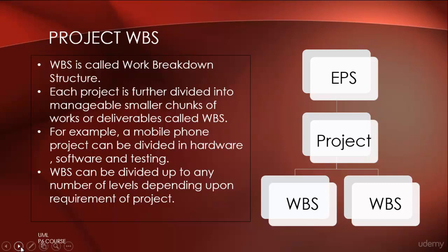For example, let's say we have a project to create a new mobile phone. We can divide this project into various WBS such as hardware, software and testing. WBS can be divided up to any number of levels, depends upon the requirements of the project and the details we need.